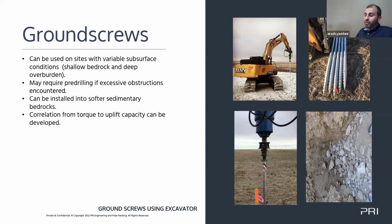And if you don't have that properly accounted for and quantified up front, that's a contractor's dream. A contractor told me a couple of weeks ago their job is to find the holes in the design. And a good contractor will find those holes in the design. No, it wasn't Dan, actually. It was outside of solar, but they will find the holes in the design, and they will change order the project. And that's unfortunately a lot of cases.